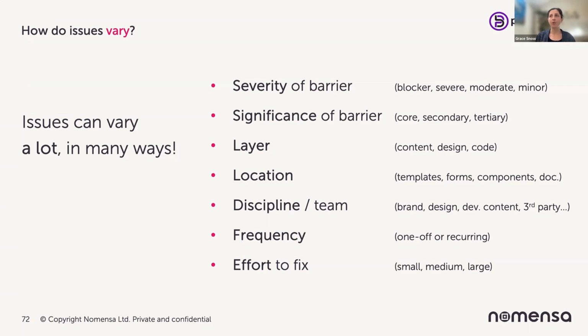Is it in template level, forms, components, documents, by discipline, team or role? So is it brand, is it design, is it dev? So who's responsible? The frequency of it: is it one-off, is it recurring? And the effort to fix. I like to think of effort to fix as in t-shirt sizes. So is it small, is it medium, is it large?